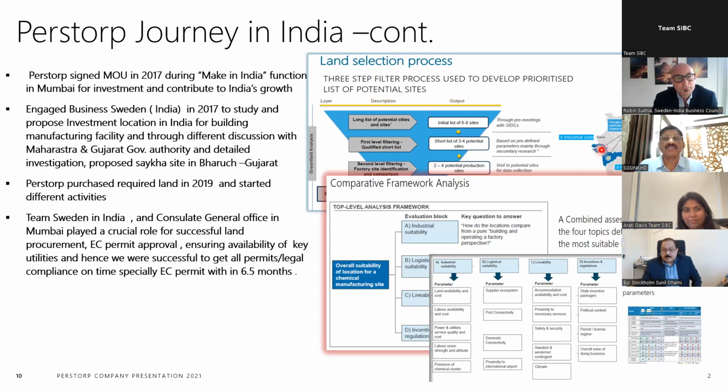So they gave us a few land slots where we can select. Based upon that, then there was a physical site visit, by considering different parameters, which included the incentive, the sustainability, the land availability for future expansion, as well as the upstream, downstream connectivity and utility for us. Because our top management visited a few construction sites of other companies, and we picked up some of the points.